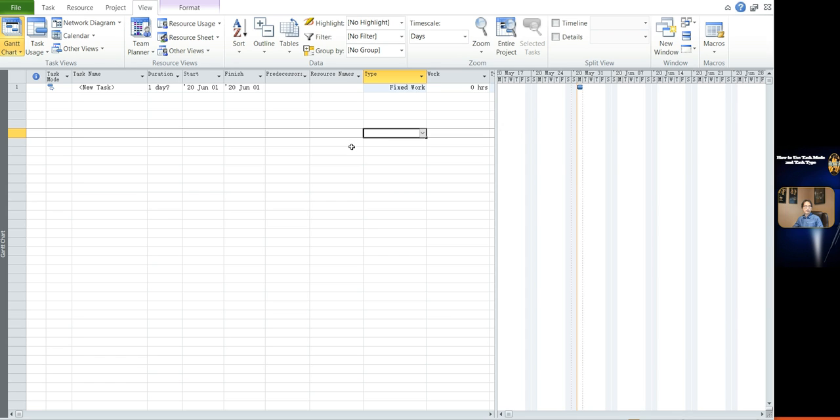If I only have one person available for this task, what is the duration to complete this task with 80 hours for this task and one person? Duration can be calculated by auto schedule, if you have a working hours and a number of the crew member and a working calendar. Let me show you how the auto schedule makes it work.